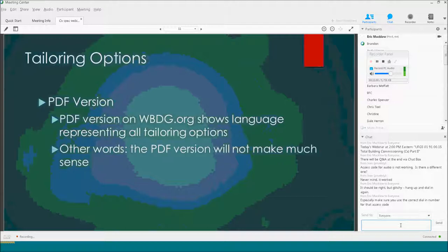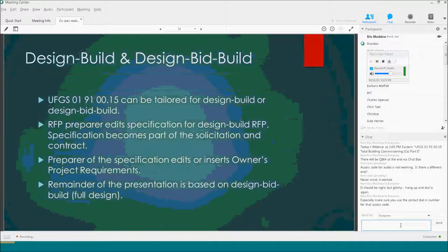I have copies of PDFs that have been edited for specific scenarios that I can send out to the community. The spec is meant to be edited for both Design-Build and Design-Bid-Build by simply clicking the tailoring option. For Design-Build, the RFP preparer edits the specification and it becomes part of the solicitation package. We're not letting the contractor post-award or the designer of record edit the specification — this is meant to be part of the contract, not a design package after the contract has been awarded.